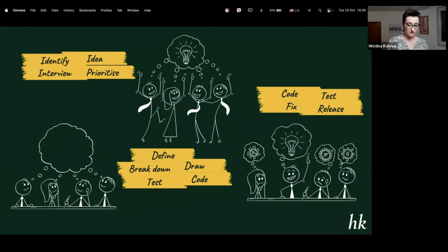This is actually what I'm showing you, an extension of a process I've tried: write a product requirement document and then immediately review it with the entire team, do the test analysis together, come up with non-functional requirements, risks, test cases, and the potential technical solution, refine it as a document, then write one story, just deliver.